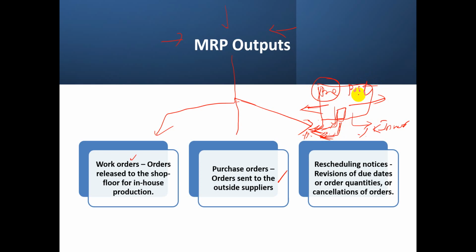Sometimes the customer postpones the project, so immediately we, as a company, as an engineer sitting in MRP or PPC, have to verify, and we have to stop some of the orders already started, so that we can minimize the inventory carrying cost. Here the purchaser plays a major role.